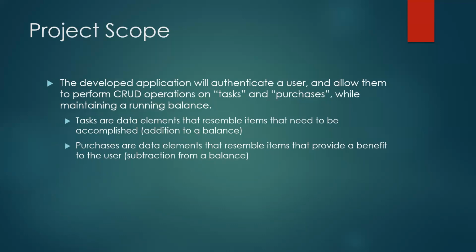However, between the project planning phase and requirements gathering phase, the scope of this project changed to an application that now allows a user to manipulate data elements similar to tasks and purchases, performing CRUD (create, read, update, and delete) operations along the way. Unfortunately, the scope for the project continued to change through the development process, leaving some of the original requirements in an unfinished state.